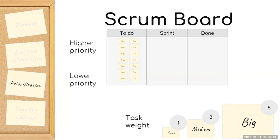When I talk about the size of tasks, in scrum they attribute more numbers, but I'm going to simplify it: small, medium, and big. If a task is small, we give it a point weight of one. If it's medium, it's three. If it's big, it's five. This is a simplistic version of scrum, so bear with me.